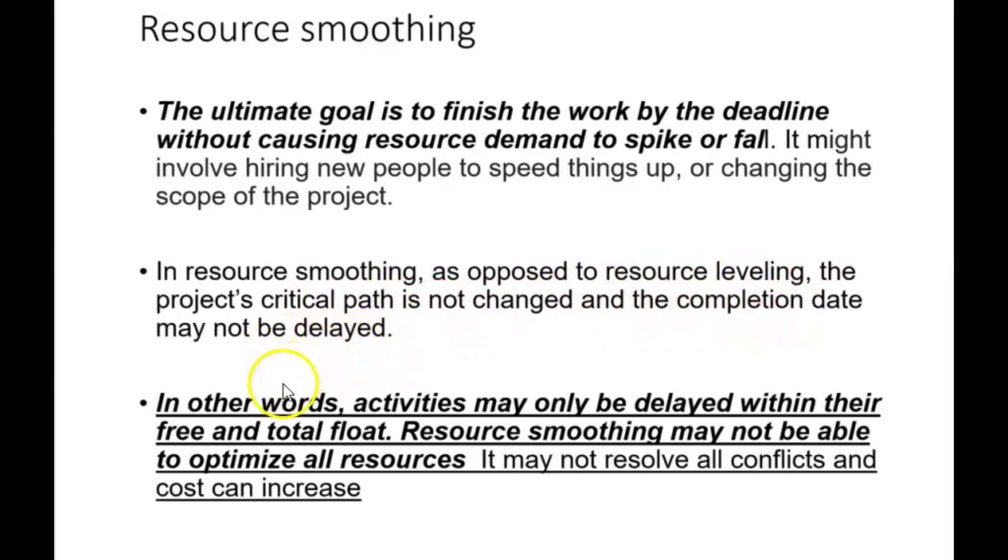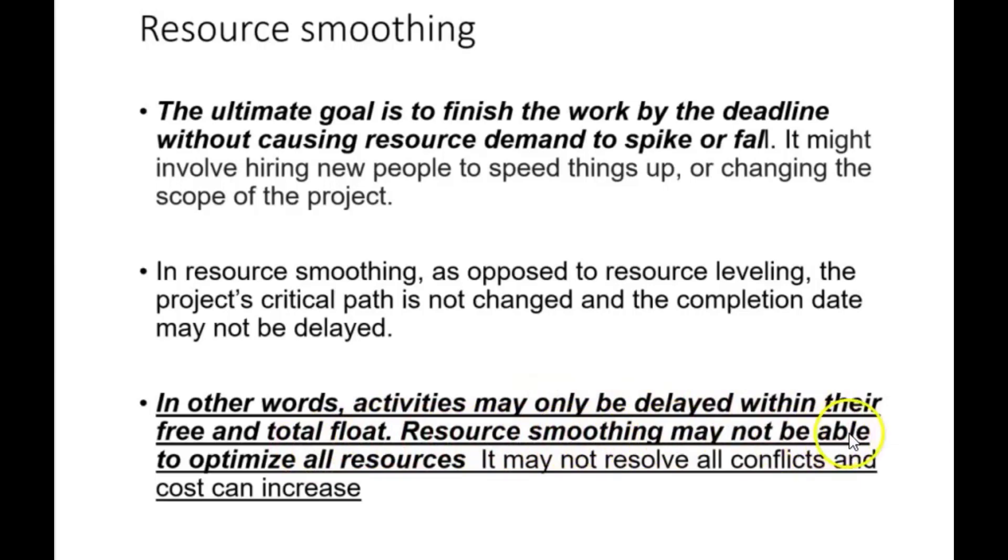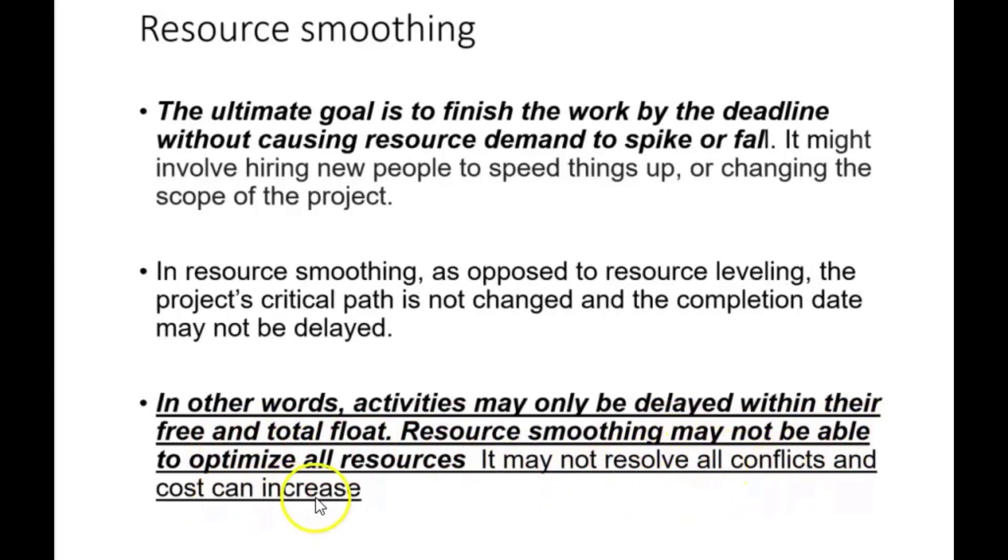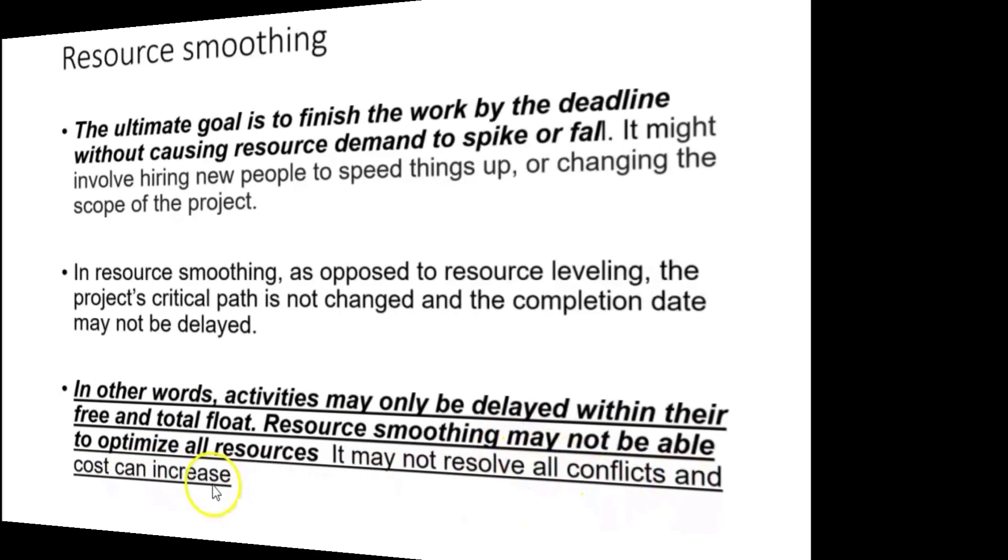In other words, activities may only be delayed within their free and total float. Resource smoothing may not be able to optimize all resources. It may not resolve all conflicts and can increase costs.